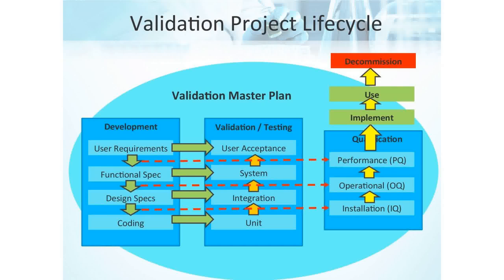And this type of testing is usually performed by the people who interact with the system the most, right, the users. Yep. Absolutely. And once all qualifications have been met, the system is implemented in a production environment. This may mean running the IQs and OQs again. So this is important. When you develop in a development instance, you do your validation testing in a val instance. Yeah, it's a copy of production. Right. So then when you go to production, whether implementing a new system from blank, or an upgrade on an existing system, the val instance actually serves as the practice run for you to execute the IQ scripts, installation qualification, and OQ scripts,